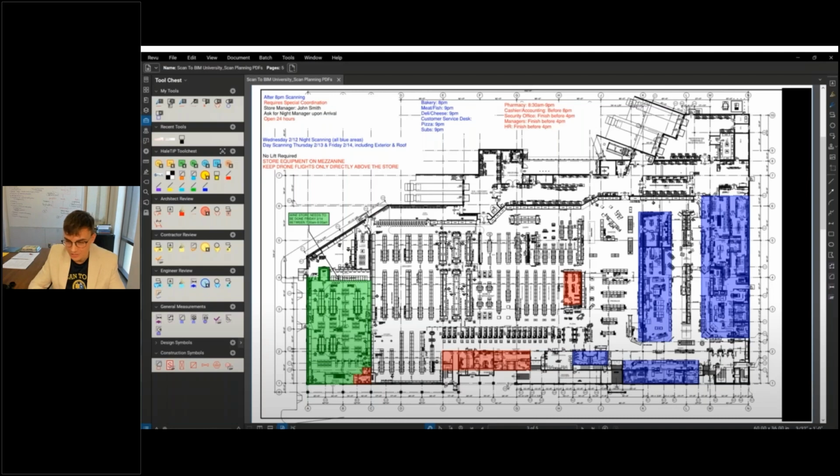And staffing large projects: a minimum of 3 people, 2 scanners, so that everything can be rotating. Especially on multi-day jobs, this will prevent burnout. And if you're performing several services like scanning and drone and 360 photos, all of these things can be done in parallel.